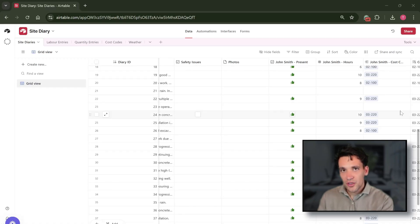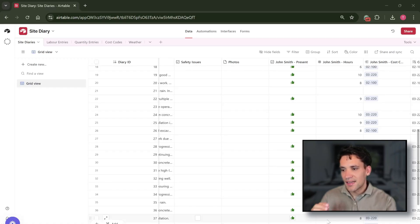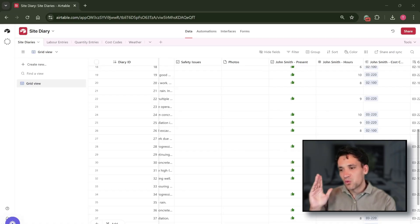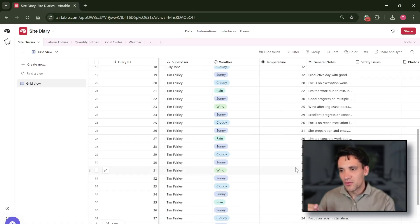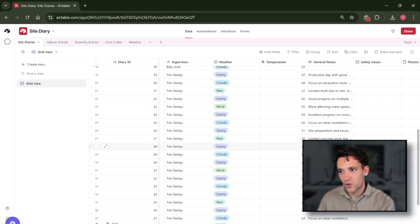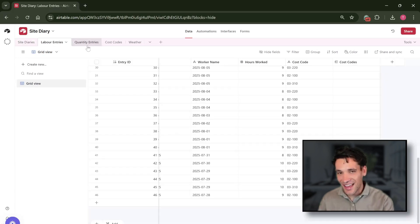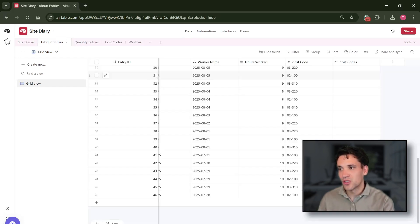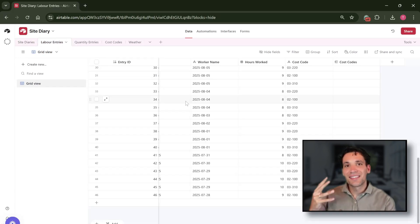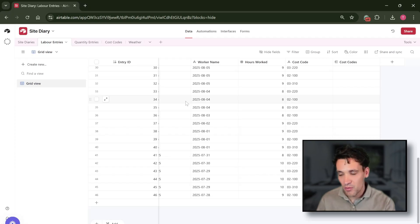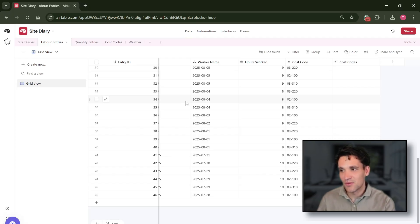Now an important concept with Airtable is that one form relates to one table, and each form you fill out will create a new record in a table. That's why we also have to have these labor entry and quantity entry tables so we can sum the total amount of work done against a specific cost code.